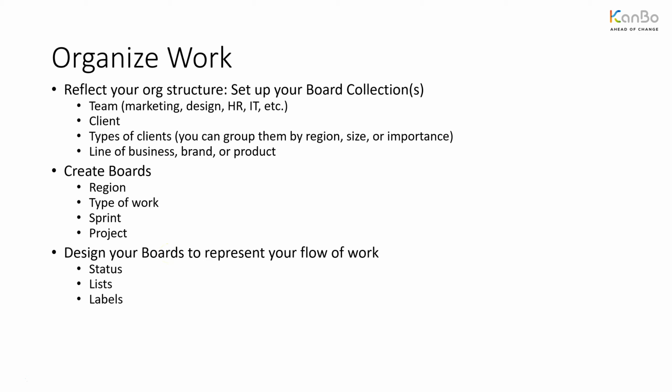Okay, so obviously when you have a board, then you should adapt the board to represent the flow of work you want to capture by this board. So you could organize it by status. So for example, if you have a process, for example, an incoming invoice process or a work request process or any other process that basically has stages, then it's a very good idea to do it with status. So having like to do, doing, waiting, in approval, and so on, that would be your stages.